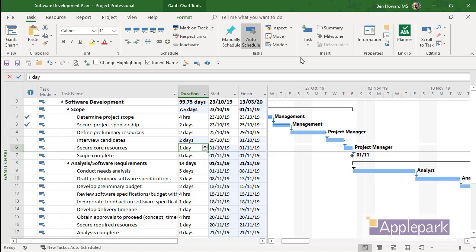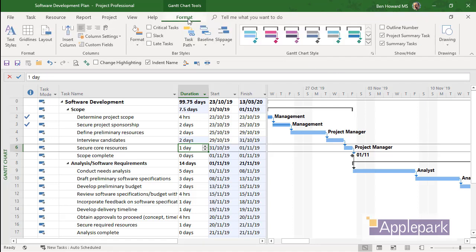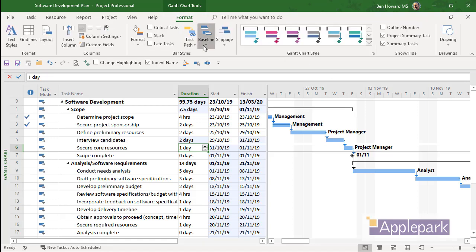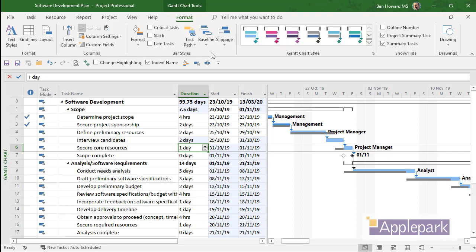And of course it's changed the successor tasks based upon the dependencies. We can see that change because we can click on Format Baseline and have a look at the original baseline or have a look at the baseline we're currently tracking to.